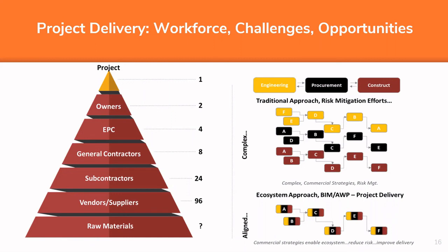So what we're just illustrating here is everybody's ultimately getting to the end, but it's very disjointed, which would explain why Lloyd was commenting earlier that you may have the majority of your materials available in a construction work package, but you may not have all. So you have to be a little more discreet about how you can actually take what you do have available and assemble that into a usable IWP so that you can make guys productive.